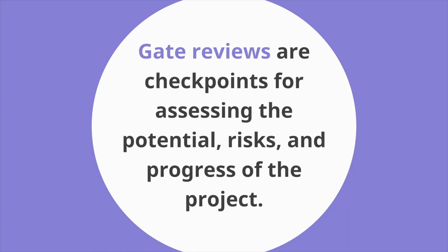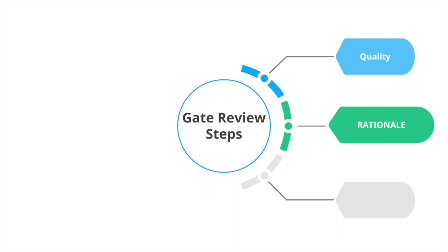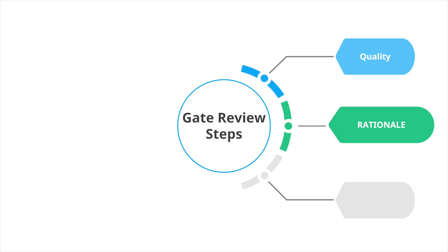To reach the launch phase, a project must pass many gate reviews. Gate reviews are checkpoints for assessing the potential risks and progress of the project and deciding whether to allocate additional resources to it. They also provide a great opportunity to share feedback with all teams involved. A gate review typically includes three steps: quality of execution — evaluating the quality of the previous phase; business rationale — determining whether the project can be fruitful; and action plan — evaluating whether expectations are reasonable and resources are sufficient.